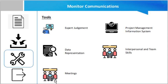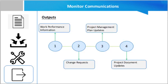The outputs for this process are: work performance information, which includes how project communication is performing by comparing the communication operations that were implemented compared to those that were planned. Change requests — the monitor communication process often results in the need for adjustment, action, and intervention on communication activities defined in the communication management plan.